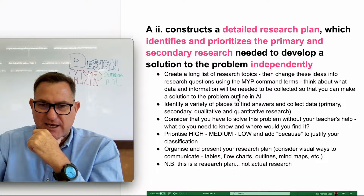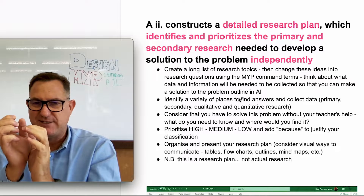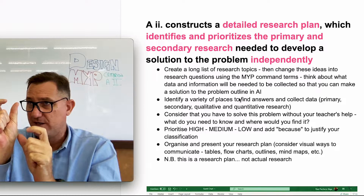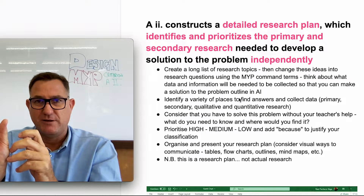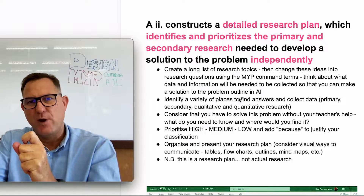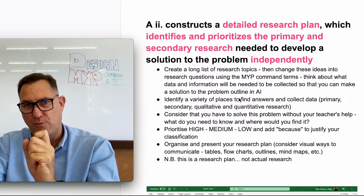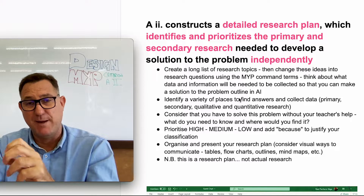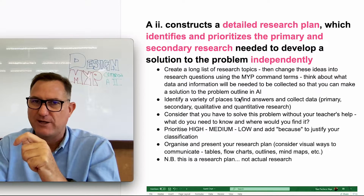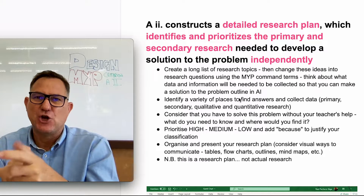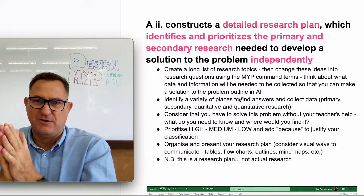Once you have your research questions, identify whether each one will involve primary or secondary research, and then take it one step further — actually think about where you're going to find this information. List specific YouTube videos, books from the school library, or if you're doing primary research, name the expert you're going to interview, their title, why you're interviewing them, and what information you expect to get from them.